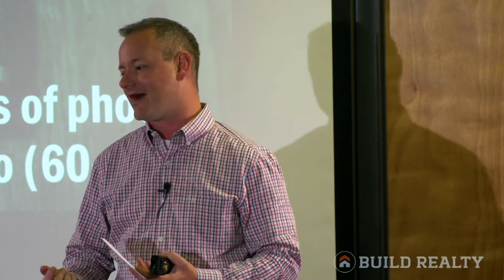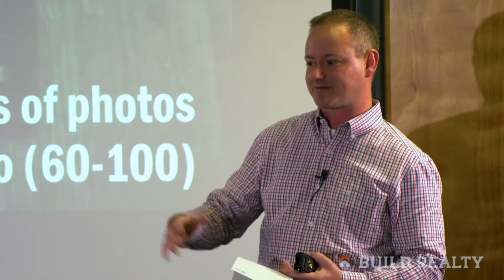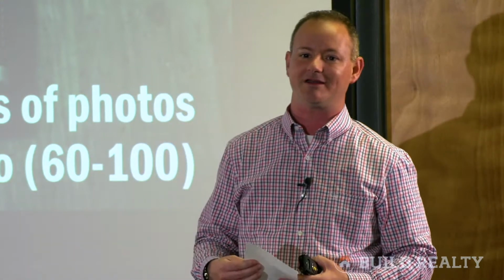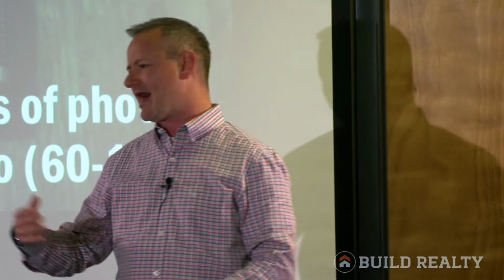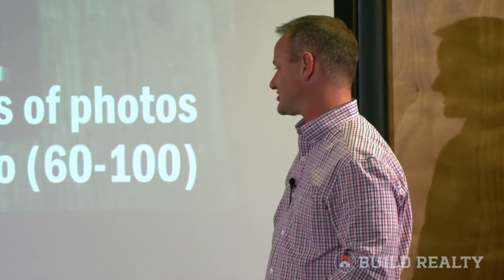The one time that I first started doing this when I was back in my rehabbing days in the mid-2000s, fortunately, I took videos. So I didn't do a lot of the rehabs myself. I hired contractors, but I took videos and I took a lot of pictures beforehand. And it really helped out at the end when a contractor would say, well, that was like that before, or no, that wasn't like that before. And I had pictures I could go back and refer. So it's just a really, really good idea to go in and take a ton of pictures.